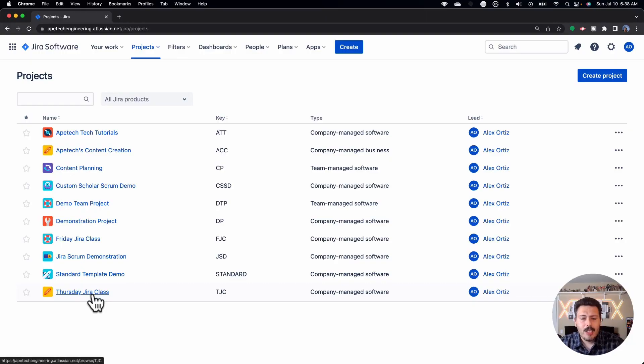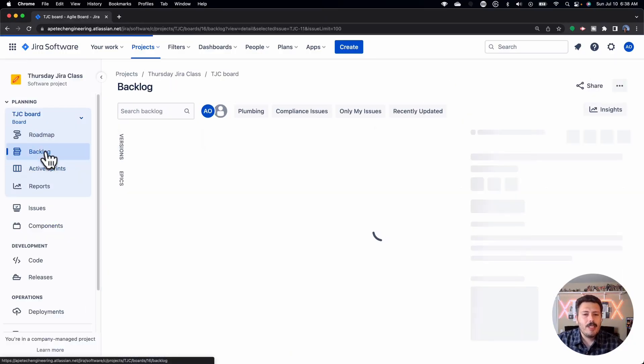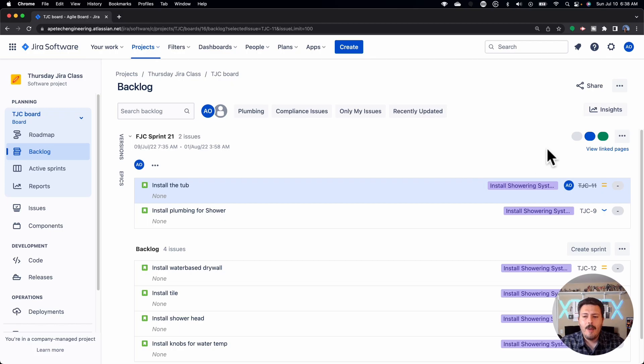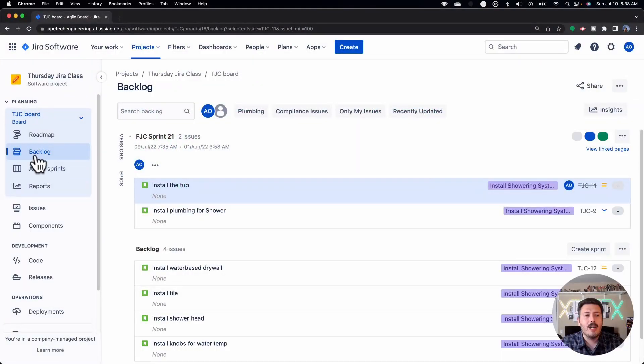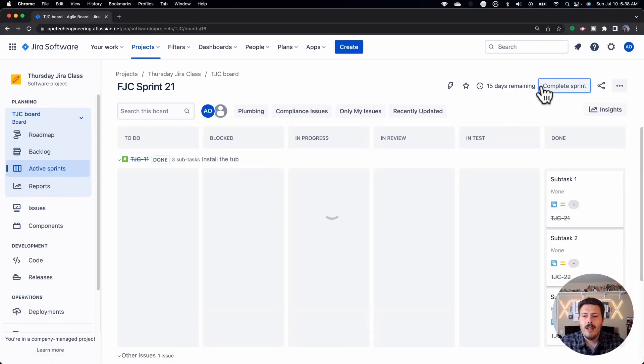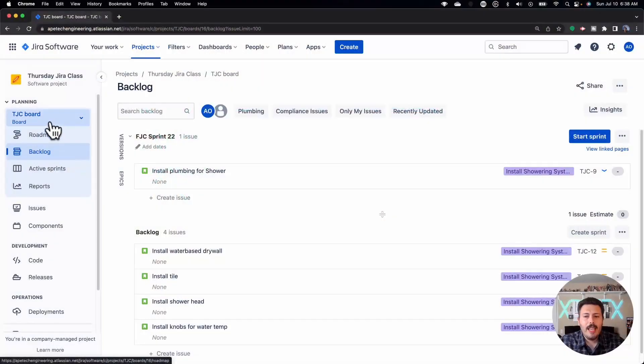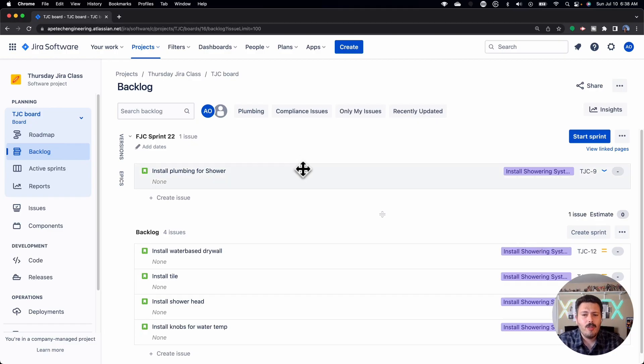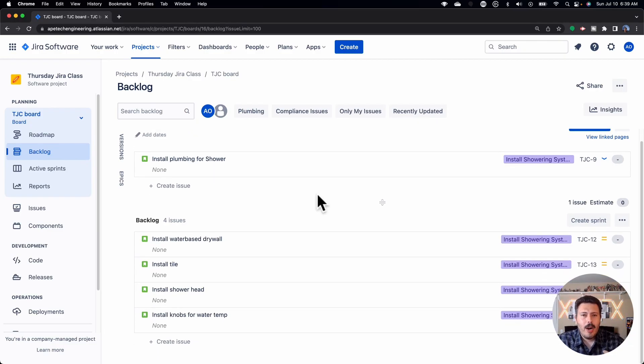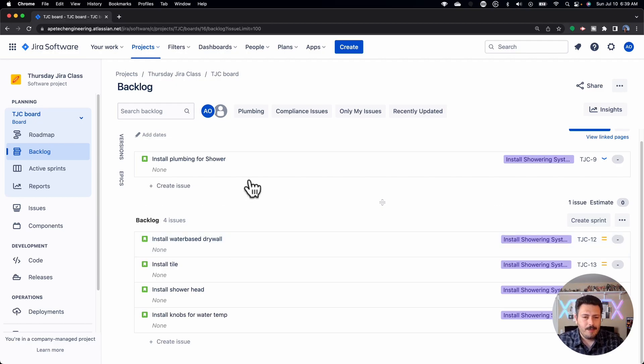Once you're there, I'm just going to go into an existing project that I have, and a couple of things that I want to show you and highlight as the Scrum Master. First of all, usually you'll be in the backlog. This is where you're going to be at least once every two weeks, at least once at the beginning of your sprint. And this is really where all your sprint planning events take place. When you're thinking about the ceremonies of Agile, the sprint planning ceremony is mainly going to be done and performed here in the backlog.